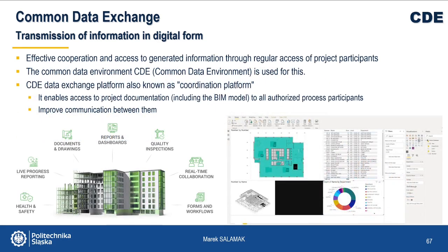According to the provisions of ISO 19650, in order to enable effective cooperation and access to generated information, it should be regularly made available to all project participants in a common data environment.